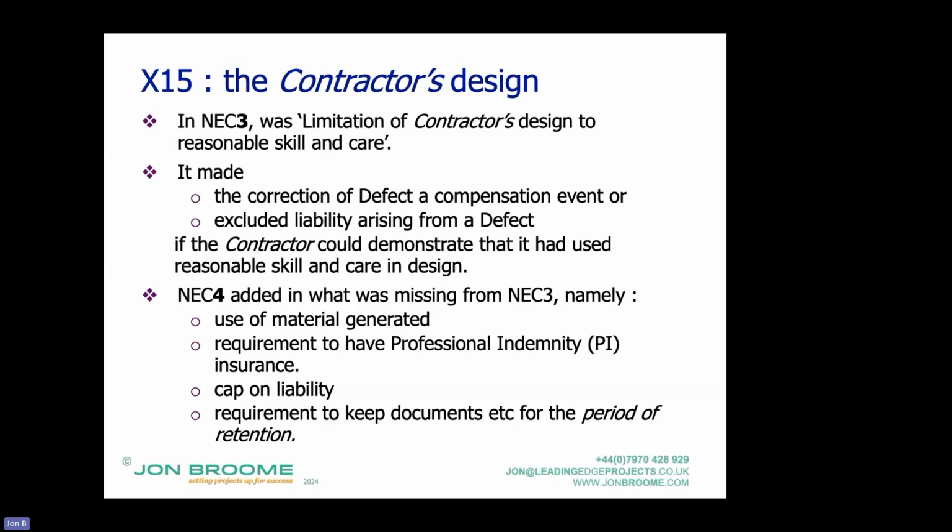Okay. So that's the same in NEC4, but NEC4 also added in these other things which were missing and which lawyers were writing Z clauses, additional conditions of contract, to cover. So use of the material generated, what it can be used for, as in it can be used for these works. A requirement to have professional indemnity insurance. And the cap on the liability, so typically 5 or 10 million pounds for most big consultants.